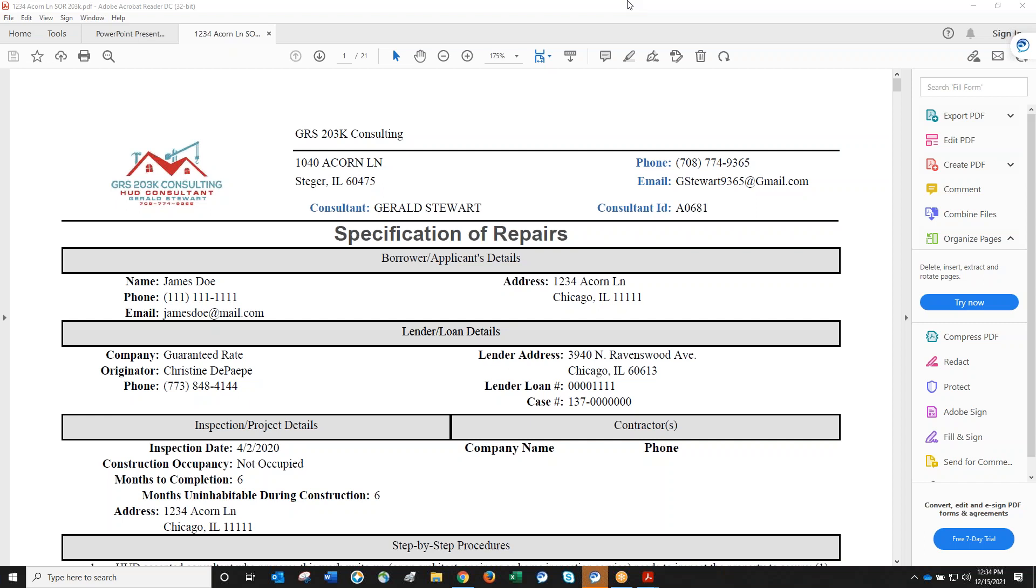The contractor writes up a change order on their letterhead specifying the repair and cost. The consultant then writes it up on the necessary forms required by the bank, which differ for HomeStyle versus 203k loans. This is submitted to the lender for pre-approval. Every change order requires pre-approval so the contractor knows they'll be paid.